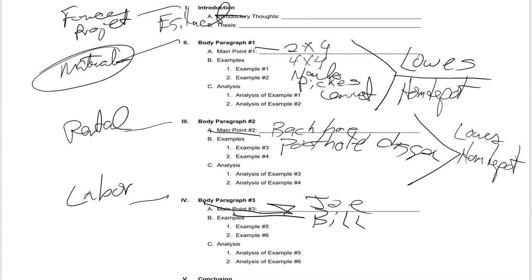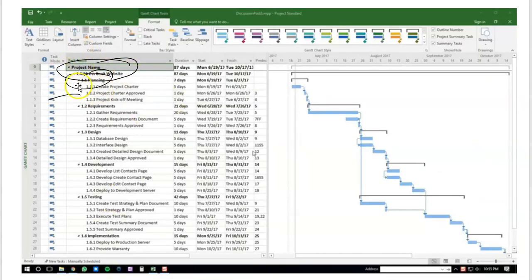So then we take it a little further and say, we can apply this on this Gantt chart. You see here, this would be the fence, and then we have all of our steps here. This is our outline. Now what we have to do is say, how long is it going to take us to do that fence? Five days, six days? Then we need to decide, when does it start? And when are we going to finish it?